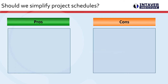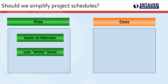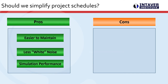Let's take a look at the trade-offs of using simplified models. It can minimize the effort required to maintain the risk model. It minimizes much of the white noise that is created by a simulation on mega projects. And finally, it can improve simulation performance, which is critical if you need to perform scenario analysis.